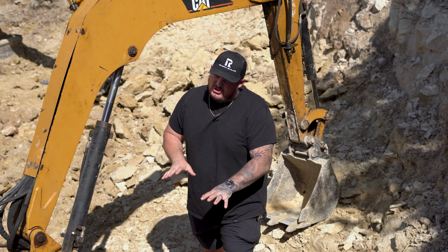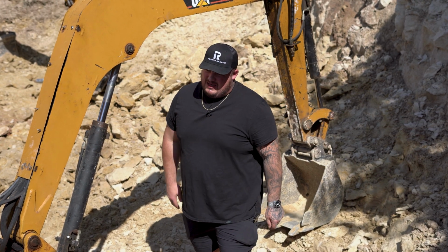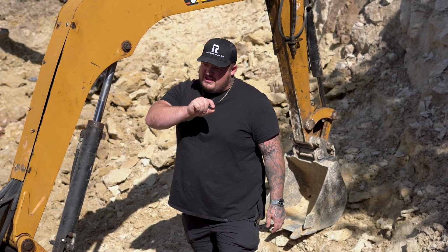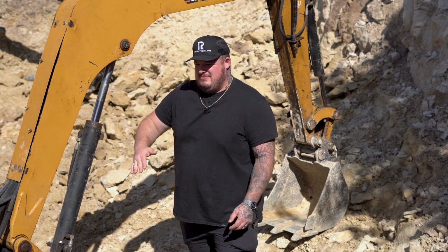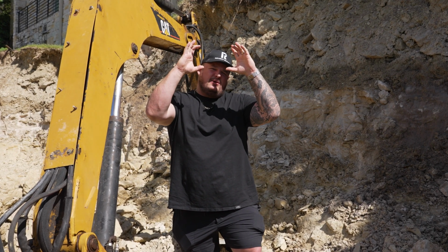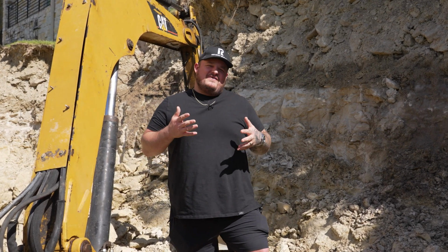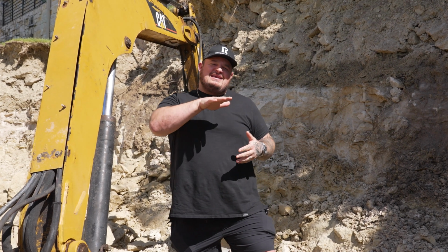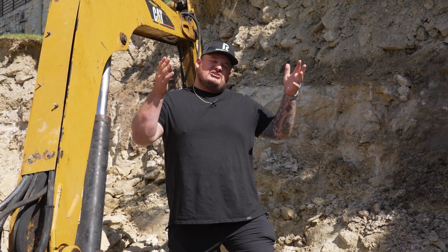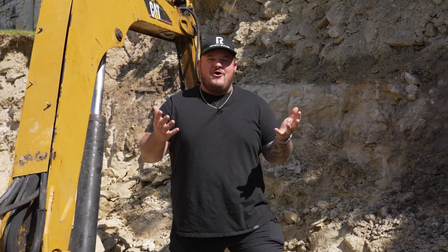So, at the very most bottom level, this is a covered patio, so it is waterproofed on the top. On the plans, it said to slope this patio 1/4 inch per foot so that it could drain. The way that our soffits lined up, there was not enough space inside the subfloor for us to do floor drains. Lo and behold, when we build it, we find out that the truss company did not give us sloped trusses. They were all flat. And then my framers, they just put in those flat trusses and they didn't slope it. The whole thing was already built.